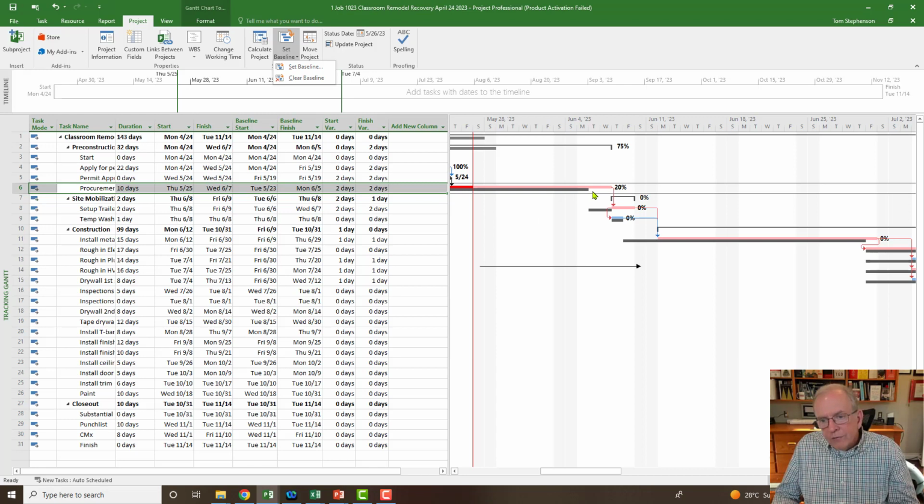I've got a process using the direct method. I look along the critical path. I look sooner rather than later. You saw how I tried to fix it fairly quickly. I didn't try to fix it way down at the end of the project. I look for the no or low cost solution. What's the least costly way of getting this project back on schedule, right? So I look at detect along the critical path. I look more immediate. I try to reduce or have no costs involved.